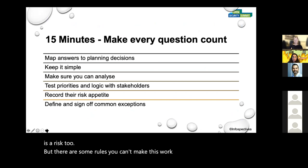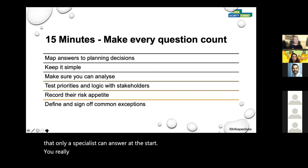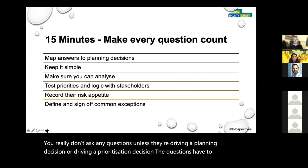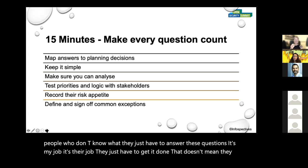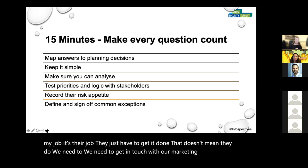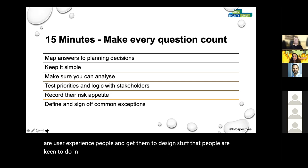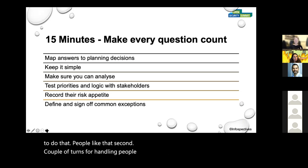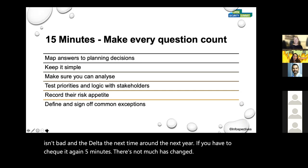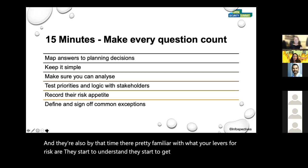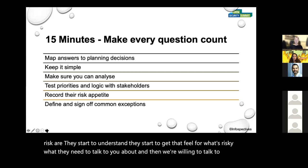There are some rules. You can't make this work if you're asking things that only a specialist can answer at the start. You really don't ask any questions unless they're driving a planning or prioritization decision. The questions have to be simple and pleasurable to answer — that sounds silly, but surveys work. People like them. After a couple of turns, people come back and say that isn't bad. And the delta the next time around — the next year — if you have to check again, it's five minutes. There's not much that's changed. And by that time they're pretty familiar with what your levers for risk are. They start to understand what's risky and what they need to talk to you about, and they're more willing to talk to you because you're not firing them a spreadsheet with 300 questions.